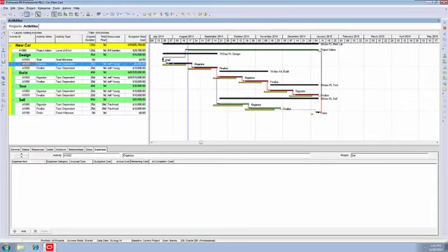So this particular activity was delayed. You can see it's slipping away from its baseline, and because they're all linked finish to start, we're getting this sort of shunting effect, like a whole row of wagons on a train. Everything shunts forward because they're all linked. This one delaying has pushed this non-critical one, the selling activity, forward, and its mate has gone forward.